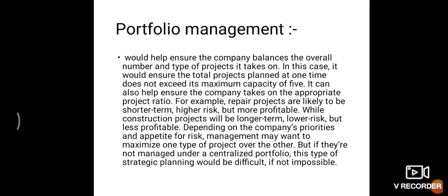It can also ensure that the company takes on the appropriate project ratio. For example, repair projects are likely to be short term and higher risk, and must be profitable at the same time, while construction projects will be longer term, lower risk but less profitable for the organization.